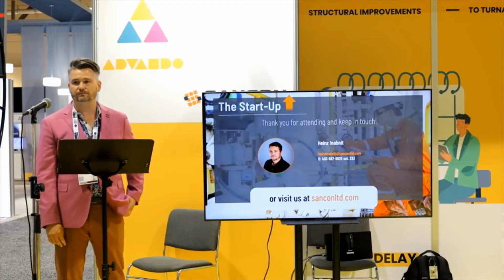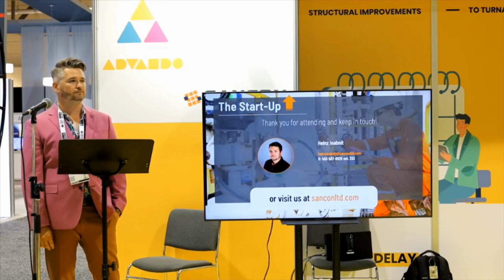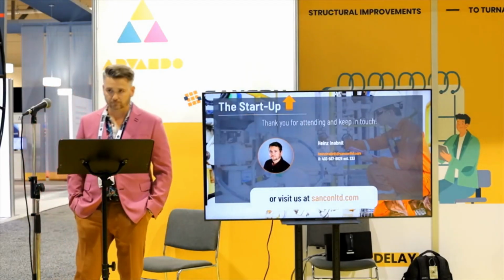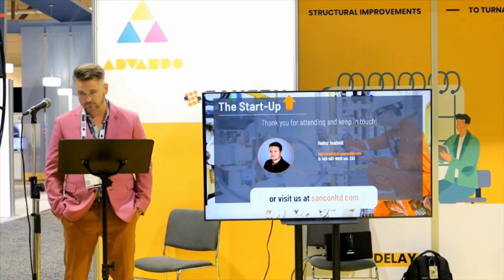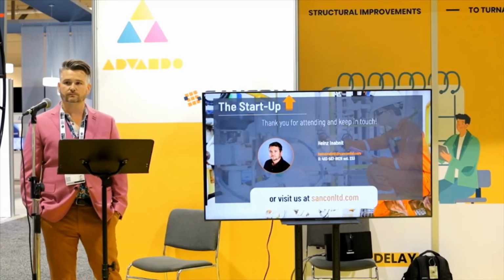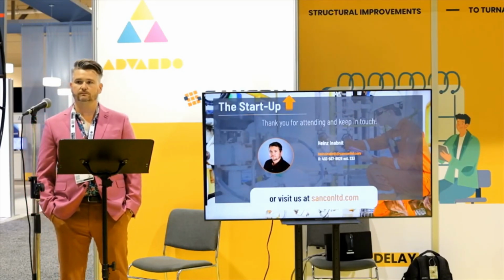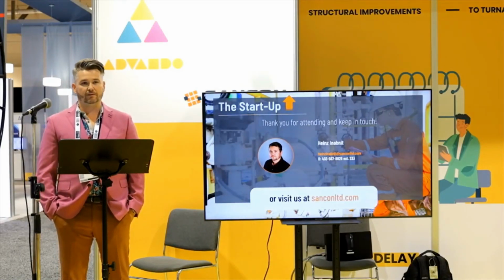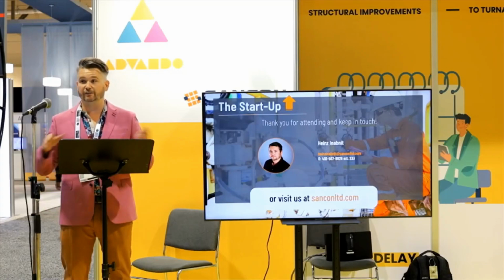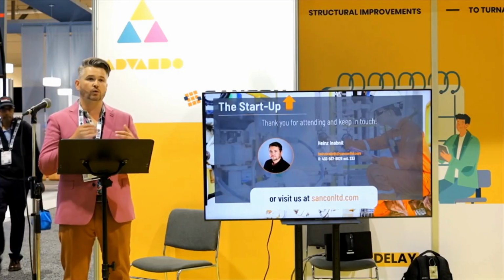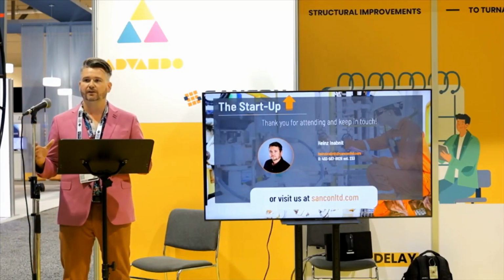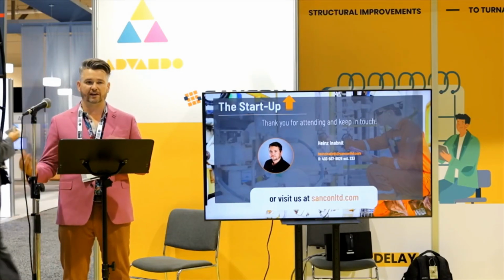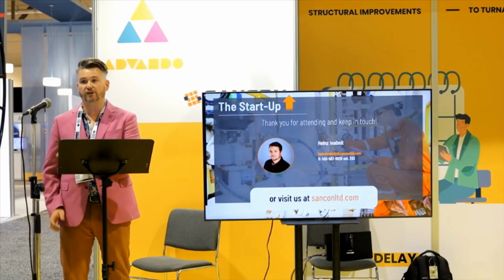So, follow-up question. I see you're mostly using groups, like the engineering group, like you said, and you're making them the responsible party. Do you ever put the person's name in there instead, or would that be the other team? I think we haven't seen it leveled to an individual person. If the project was of a size that you could name them, that would be one thing, but it should be at a group level, because that group would then be accountable for their team to execute it.